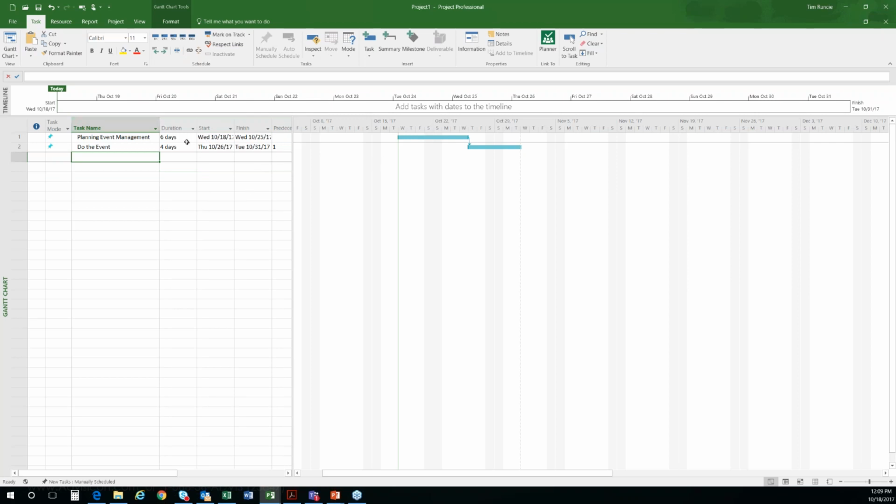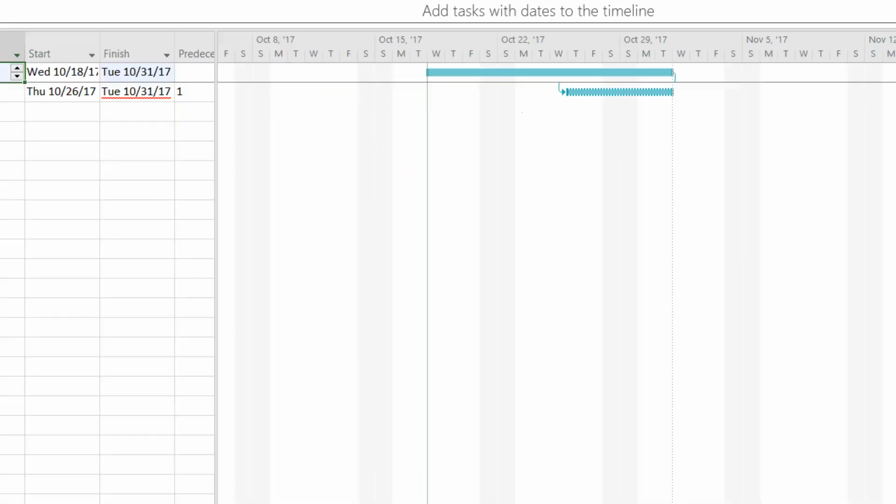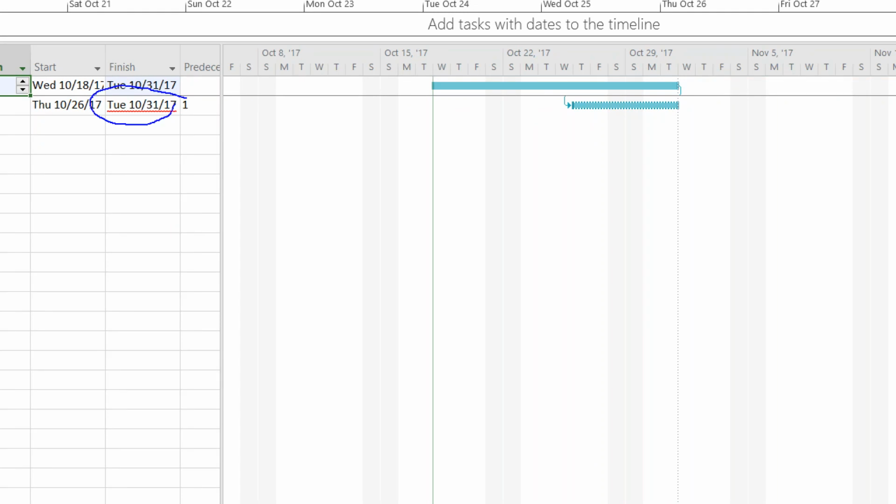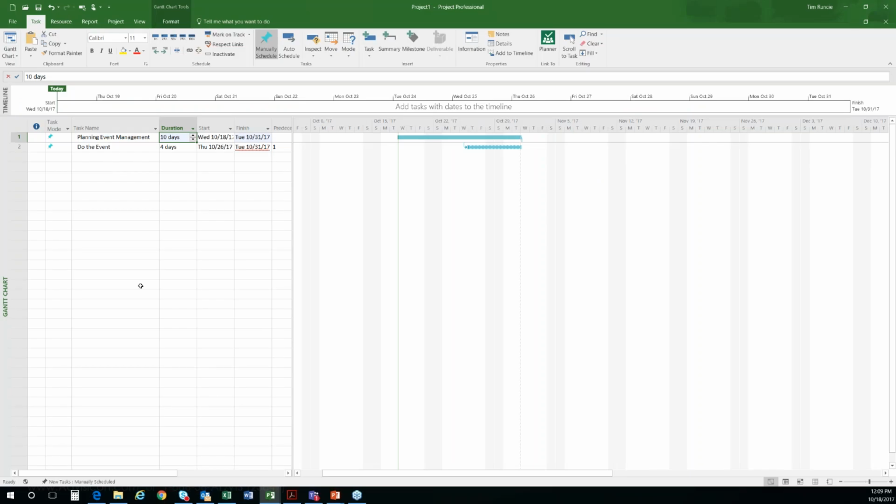Here are some of the pitfalls. Again, if I change my task number 1 from 6 days to 10 days, suddenly you would expect, in a dynamic schedule, for this to ebb and flow, so that task number 2 should have picked up and moved. And of course it doesn't, right? So if you look closely here, you can see there's a red squiggle telling you that, hey, look, if this was dynamic, that should move. You'll also see what we call the caterpillaring effect, because it looks like a little caterpillar's legs on the outside edge, saying that technically should probably move if you're in a dynamic schedule.